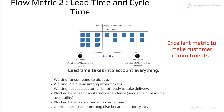So what good is lead time and cycle time? Lead time, going by the popular industry definition, runs from the time the work item is discovered till the time it is delivered or released, so it takes into account everything — if you're waiting for someone to pick up your ticket, if the ticket is waiting among other queues, if it's deprioritized, something else is put up, blocked because of an internal dependency, or blocked because you're waiting on an external team. All of it is measured under one bucket called lead time.